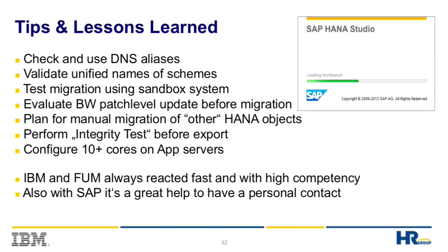Elevate the patch level, the BW patch level, because we have to update it before. The big issue was about the other objects of the HANA database that were replicated through SLT. That was a really big lesson learned for SAP as well, that this was not included during the first initial setup.